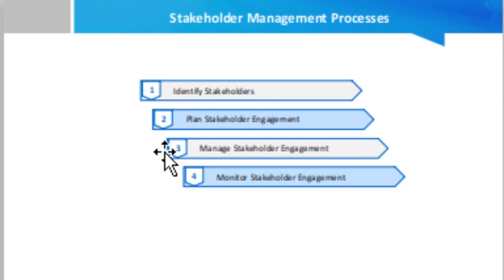The steering meeting should happen on a monthly basis, and first of all you must do your best to resolve all the issues in the project management meeting, with the project manager. If issues are not resolved, then they can be escalated to the steering committee meeting as well.